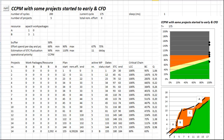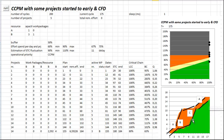So that is a continuous flow diagram. You just aggregate, you count each time when a new project is started and you add the number of projects, and you count the number of projects finished over the time. I really think this is a very strong and powerful diagram.